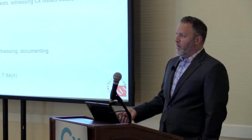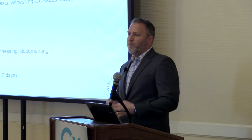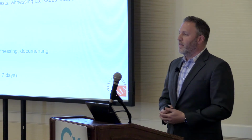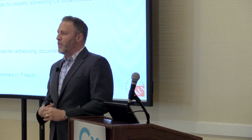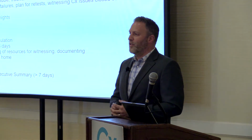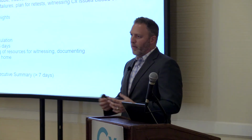So once you've completed all your level 4s, now you're working towards your integrated systems test. You're going to have multiple integrated systems tests. You might want to pre-test as a simulation to make sure everything works. What we're talking about are heat load tests in your data hall. 10 megawatt data hall, you're going to have 10 megawatts of load banks in there. Crank it up to 10 megawatts of heat. Watch everything work together. Make sure you have visibility. Make sure you've got your transient recorders in the right place. Make sure the BMS is trending and visible. Make sure it all works before you start doing it.